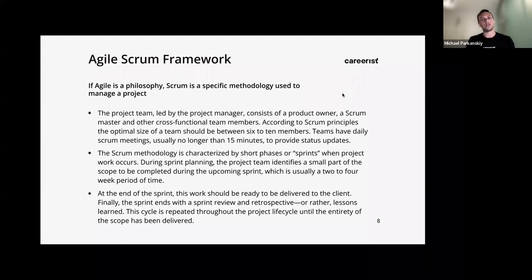And at the end of each sprint, you have what's called a review, a sprint review, or a retrospective, they also call it, where you're going to get together with your team and talk about what you did for those 2 sprints. How did the sprint go? Did you guys get to the bugs you were planning to fix in these 2 weeks, or did you get to build this feature that you wanted to build in these 2 weeks? Were you able to get to it, or do we need to move this to the next sprint?